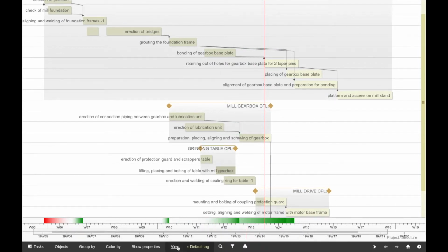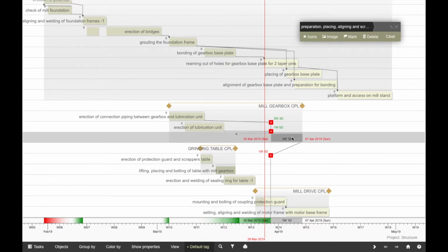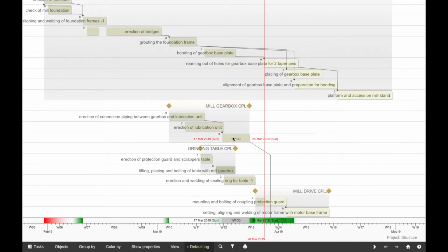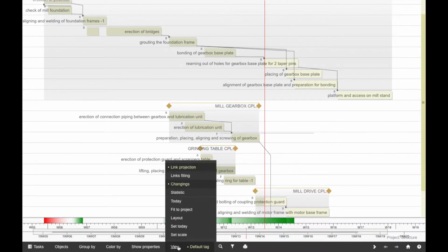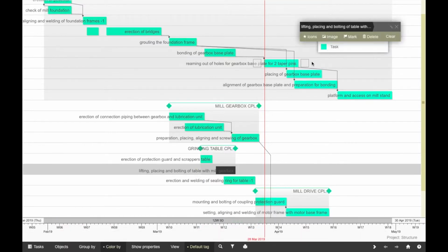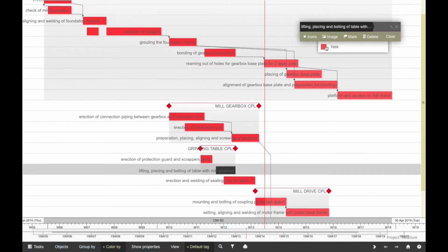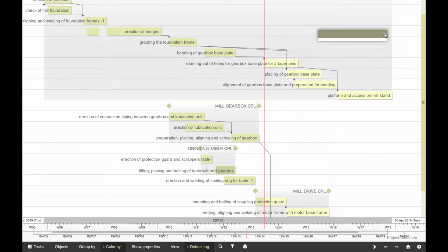The View Changings menu item shows the number of changes. Every time, when accessing history, it is possible to zero out the changes. The narrow line demonstrates the history of changes, and the number next to it allows to understand how many times the task was moved. A large number of changes indicates the quality of planning or notifies about possible problems. With the use of Color By menu item, you can paint the tasks according to their property values, linked nodes, or tags. The color filling changes in the legend, which can be hidden or relocated.